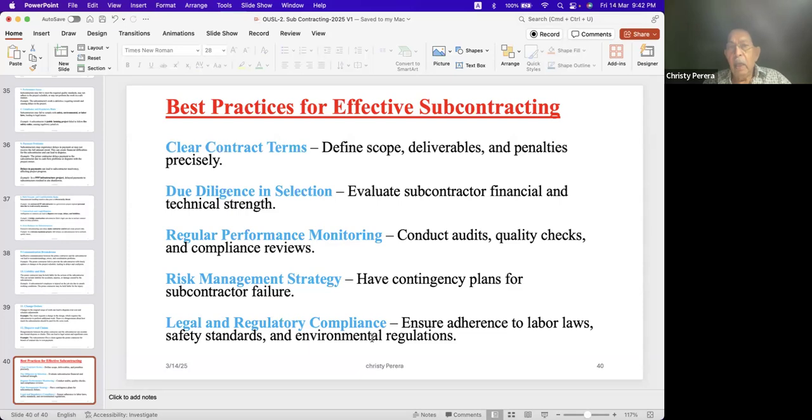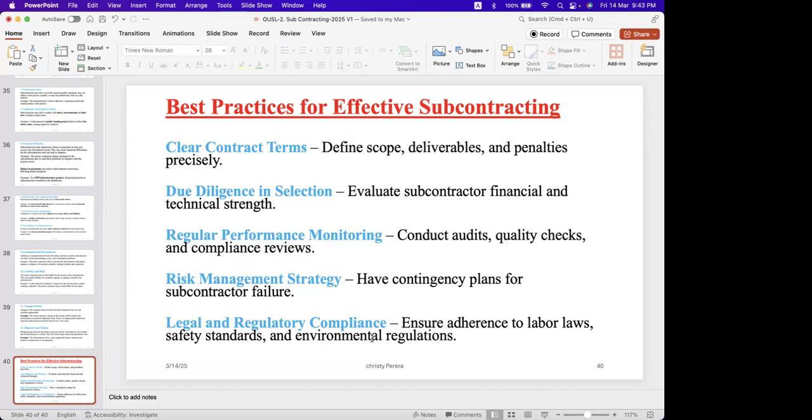But nominated subcontractors, they will have to be paid the amount that we have mentioned. Otherwise, the business person, the contractor, will definitely keep a profit margin out of the subcontracting amount also. So you mean to say when there is a nominated subcontractor, it will not be possible, is it?